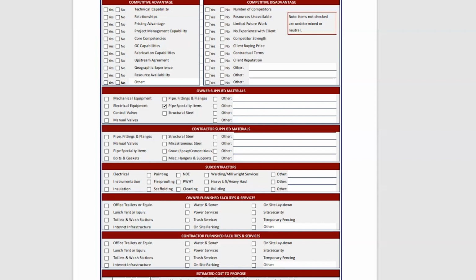And as we started learning either directly or indirectly about certain subcontractors and their performance, quality and safety, then we just wouldn't go bid to them anymore until we heard from the experience of others that things were improving. That way we weren't the ones they were trying to improve on. We didn't want to take that kind of risk.